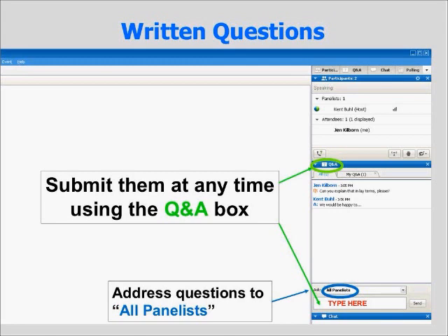Does that mean that the regulations, the 65 day-night noise level, applies to every piece of open space on the project? No. And it's generally okay if some of the open space has high noise levels, as long as there's, and this is a local call, do you feel that there is a sitting area or a recreation area that's a real important part of the project?